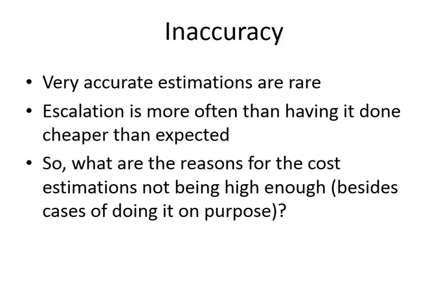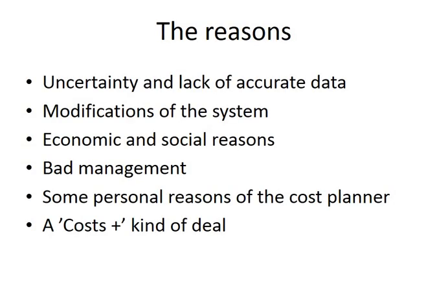So what are the reasons? Well, there are several groups of reasons: uncertainty and lack of accurate data, modifications of the system, economic and social reasons, bad management, personal reasons, and the way the deal was prepared. We will talk about each of the reasons now.